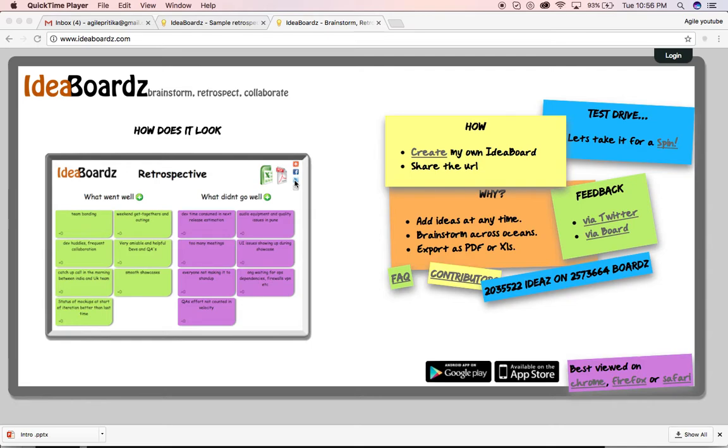And so I know a lot of your team members might say that retrospective is not really required. Do we really need to do it in every sprint? And the answer for that is yes. Even if it's just 30 minutes or 20 minutes, it's important that you come together at the end of each iteration. After your showcase is done, you want to take some downtime and just go through how the last iteration has gone.